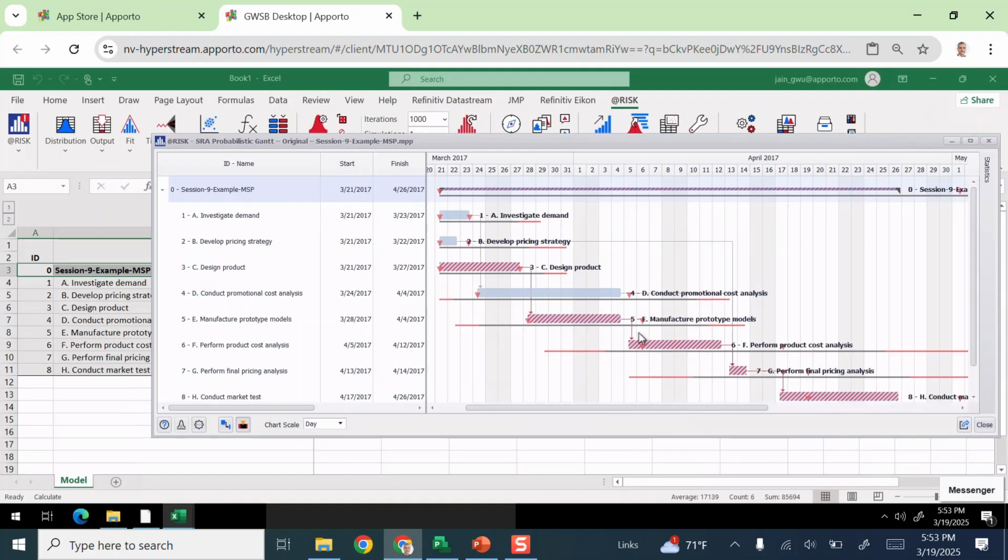The red here is showing the mean durations, the start and ending point of the mean durations. But over here in the smaller, thinner line, the red part is below 5 percentile, and over here is the 95 percentile. So the black line is showing the 5% and 95% points, and the red parts are showing the extreme values outside of that.